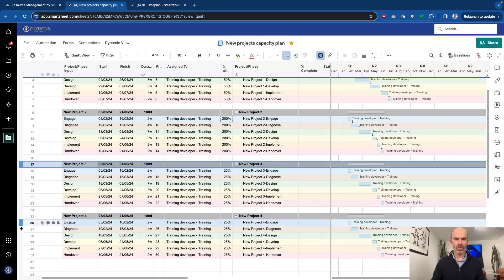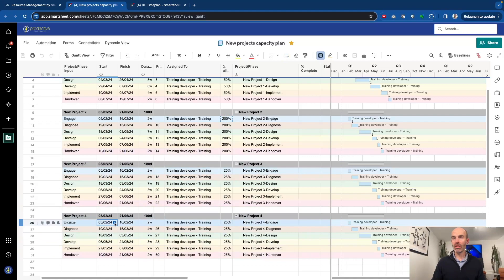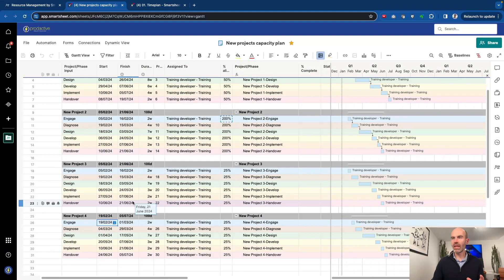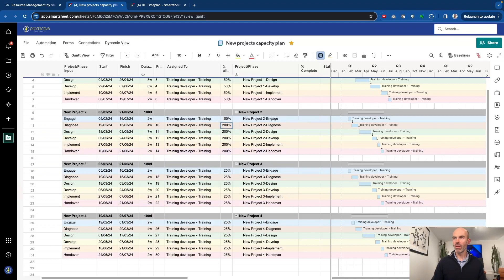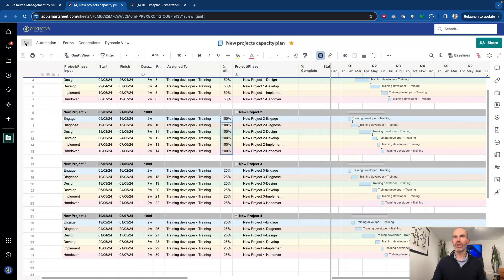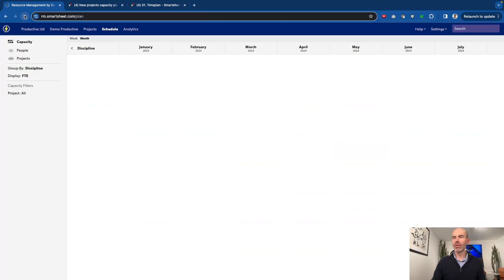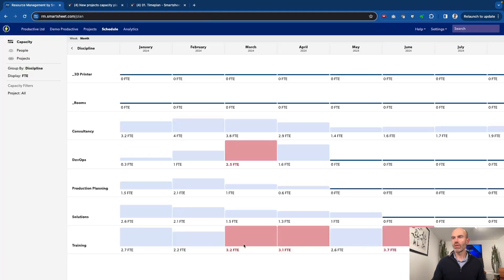Before I do that, I'm just going to change the date on this one and see what happens if I move it out to this date here. Does that make any difference? In reality, it's not because this is going to be too much. If I just reduce that down to one person for the duration, we'll see what the implication is for this project overall. If I refresh, we should see that there's actually a bit of an improvement, and we've still got some challenges.